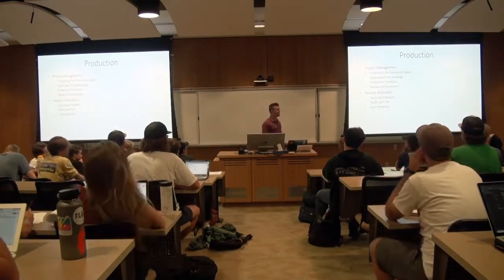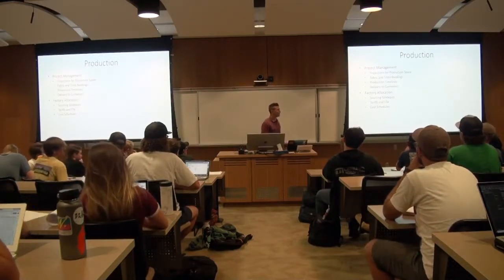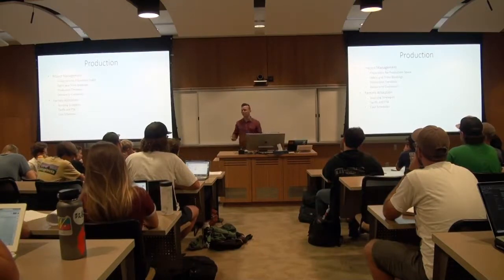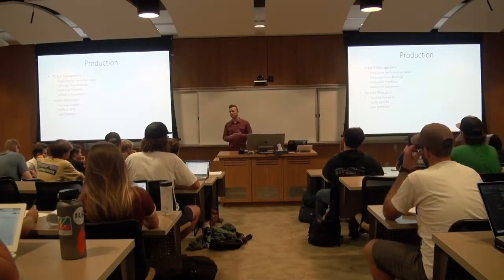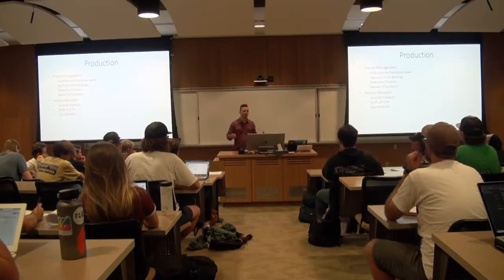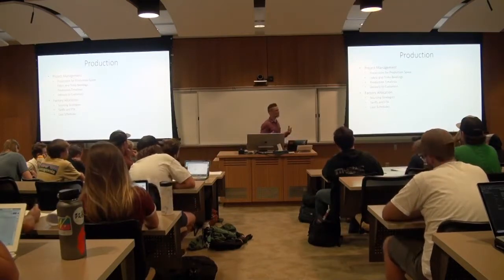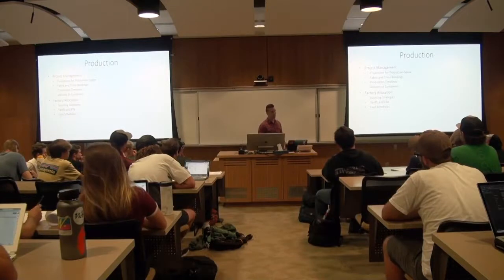Production timeline, so again, a huge part of what I'm doing during production season is being on the phone every night with factories: where are you guys at, what problems are you facing, how are we looking every day. I'm asking for a WIP report, or where are we cutting, is the fabric there, has it been relaxed, are we inspecting it, what's going on, because 1 or 2 days in the production schedule affects a lot of things.